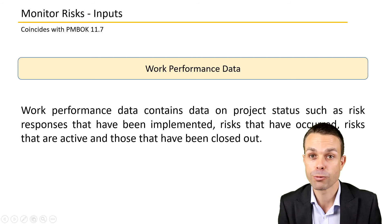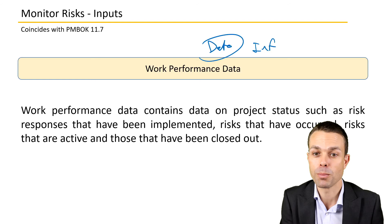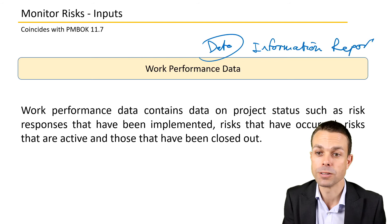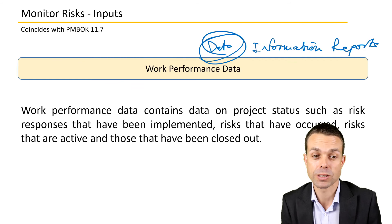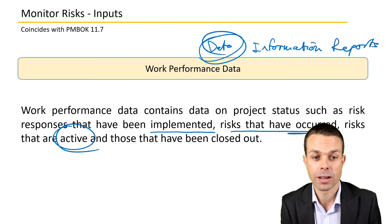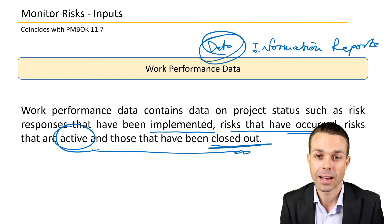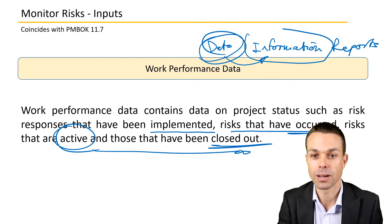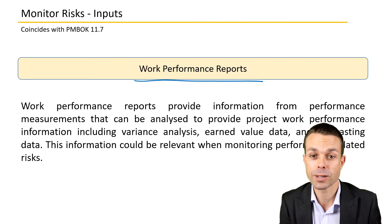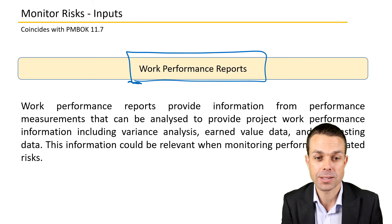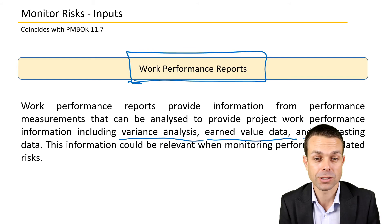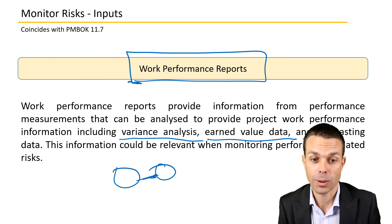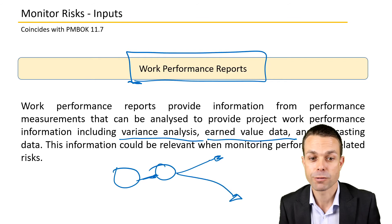Inputs we may need include work performance data — the raw data, because data turns into information and information can be turned into reports. This covers which risk responses have been implemented, risks that have occurred, risks that are currently active, and ones that have been closed out. This is pure factual information. That can go into work performance reports, because we need to know what has been sent previously to our stakeholders — things like variance analysis, earned value data — all comparing current versus actual performance and any forecasting based on that. This information can be relevant when monitoring performance-related risks.